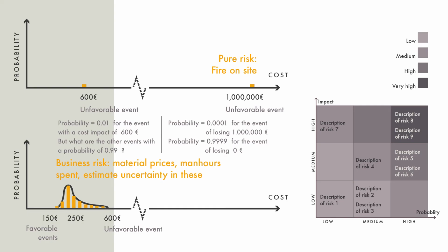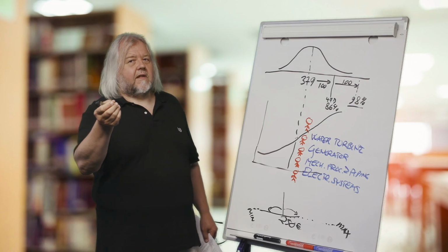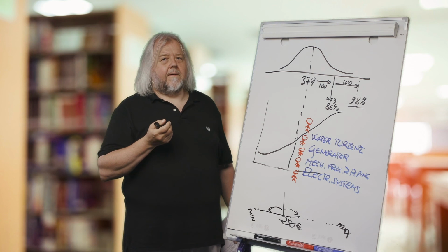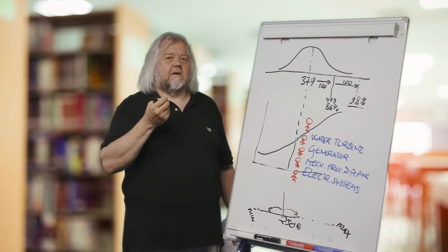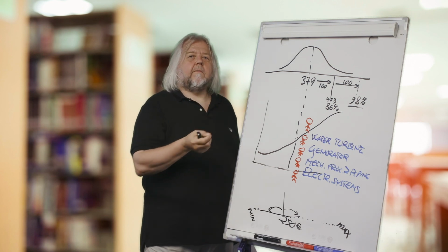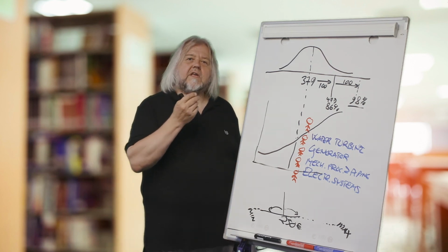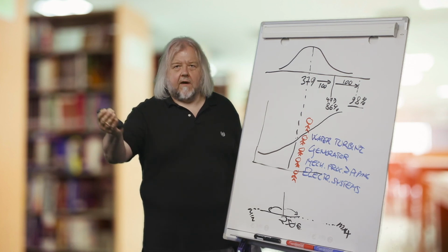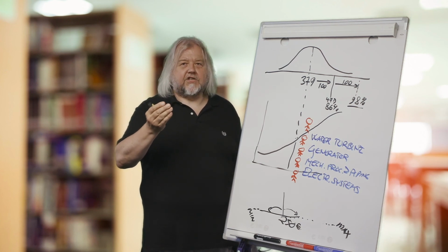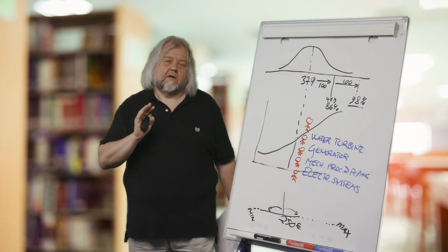And when we compare these estimation practices to, for example, the probability impact matrix, which is at the right top corner of this picture, what we put in these kinds of matrices is only the unfavorable sides of the risks. And then the question is, is it fair or is it symmetrical? Does this kind of risk management enhance our putting effort into taking advantage of the favorable sides and opportunities in projects? Or is our project risk management, if only unfavorable events are identified and evaluated, only about hedging against the bad and not taking advantage of the good?